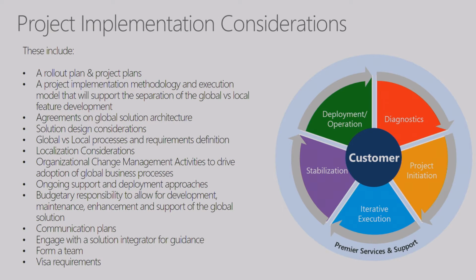You can get the requirements, because immediately agile means that you have a good team. You already have a team in place, right? Once you formalize that team, maybe for the first phase, first release, you can use iterative. And if you think that's too slow for you, maybe in the next phase you can think, hey, you already have the team members, everybody's familiar with this, and you can move a little bit faster. Maybe shrink the iteration to a shorter duration up until that 2 weeks time frame, right?